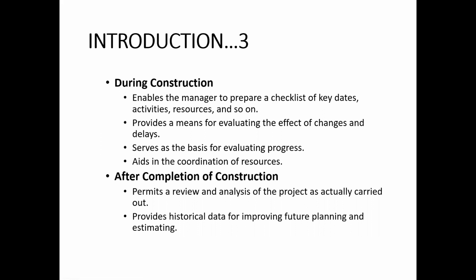Coordination of resources means, for example, certain resources, personnel and human resources, are very important. Normally in a construction project, a construction company may have several other projects taking place at the same time. So if one engineer who has a specialty in a certain kind of work is needed on that project, and at the same time that engineer is also needed on another project, there will be a problem. There will be a time conflict.